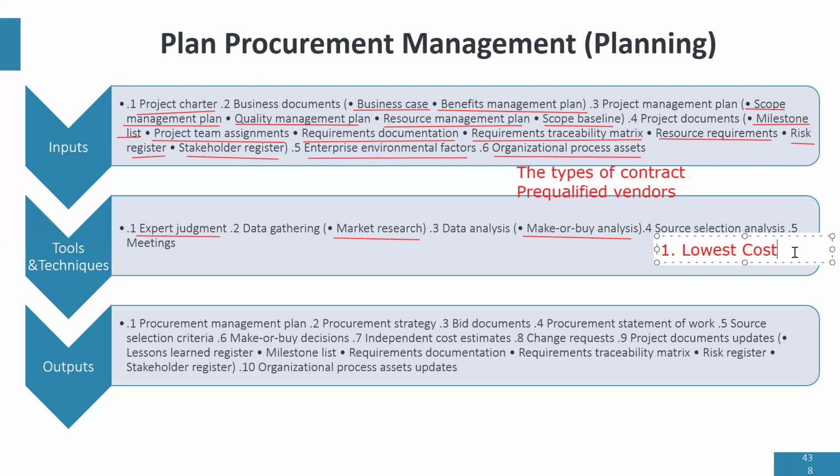They'll give you a price that to them is high, but regarding the work, it's low. So you only choose lowest cost when you're dealing with projects with a routine nature. It's not complex. Choose the lowest vendor.